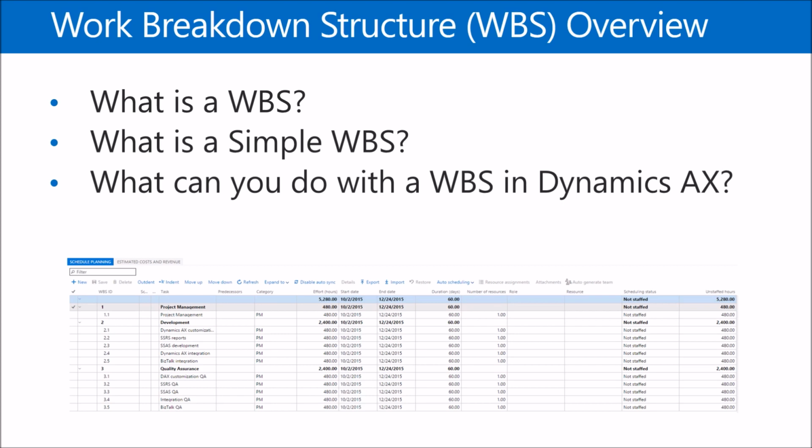AX will actually try and project the start and end date based on a calendar setup that we'll talk about in a subsequent lesson here. And the other thing that you can do is say how many resources you're going to need to complete that specific task. So the first thing that AX is going to do when you get into WBS is lay out your project plan.